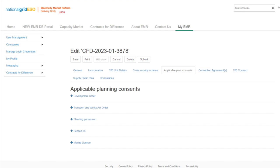Schedule 5 of the allocation framework, chapter 3 of the allocation regulations 2014 as amended, and the ESO application guidance will support applicants on the eligibility criteria for the planning consents, including requirements on documentary evidence, name, location, megawatt, dates, and technology categories. There are five sections which the applicant can provide data for: Development Order, Transport Works Act Order, Planning Permission, Section 36, and Marine Licence.